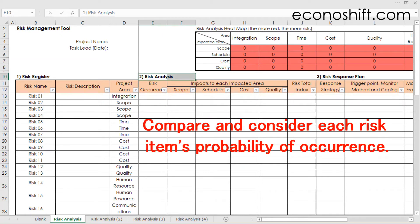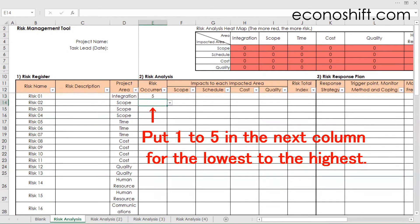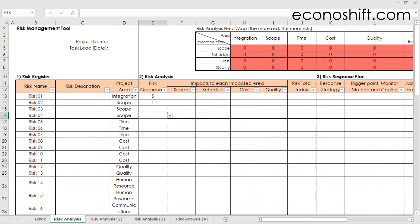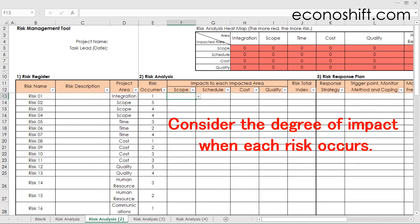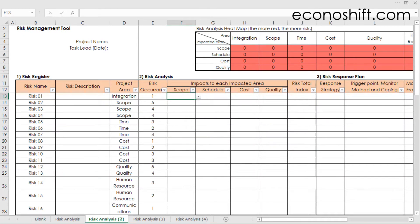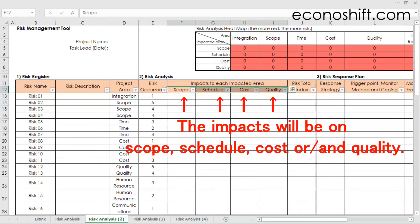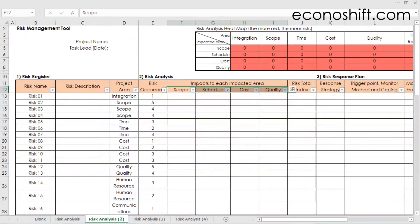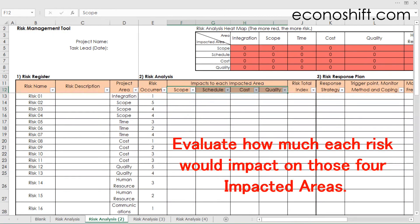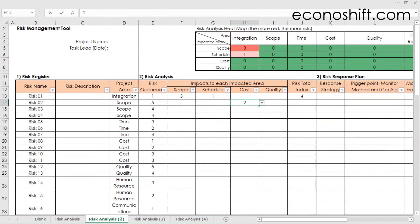Next is risk analysis. Compare and consider each risk item's probability of occurrence, then put one to five in the next column for lowest to highest. Next, consider the degree of impact when each risk occurs. PMP defines that the impacts will be on scope, schedule, cost, or quality. Therefore, in the next columns, evaluate how much each risk would impact those four areas with a scale of one to five. Leave it blank if it doesn't impact at all.